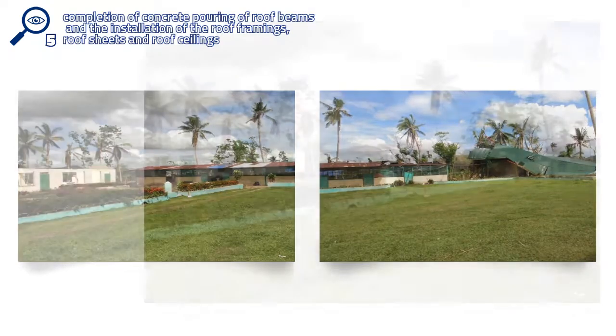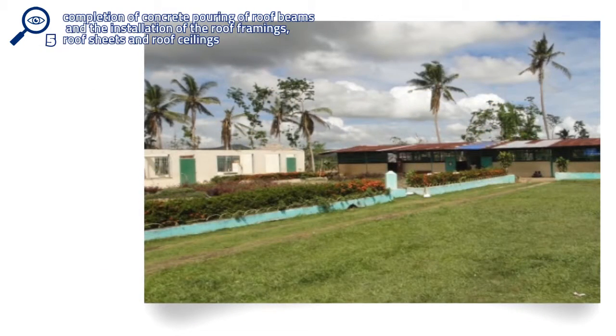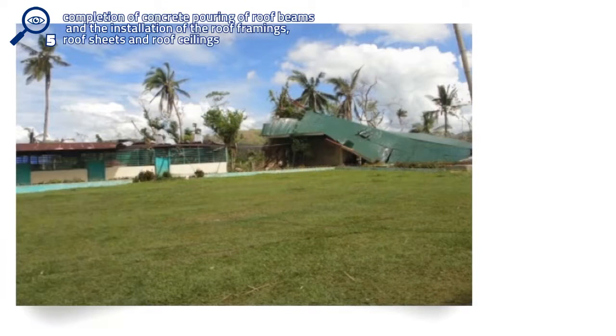Both the examples highlight that the damage was caused by failure to construct the classroom to proper building standards rather than because of faults in the design. This poor quality workmanship should have been detected at the routine quality assurance inspections during the construction process.